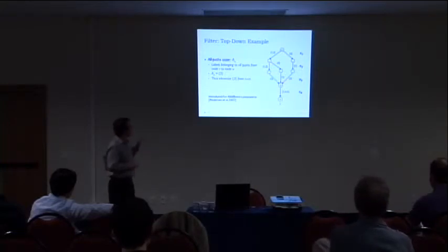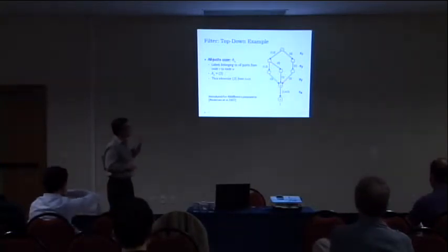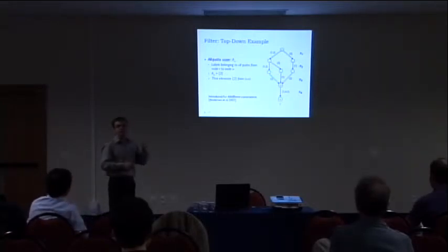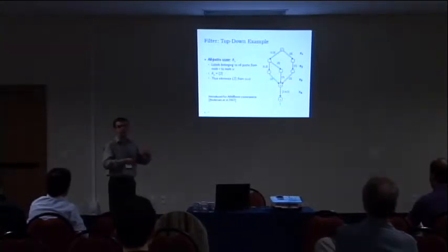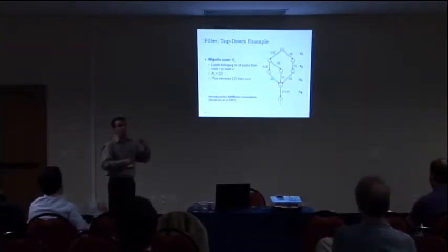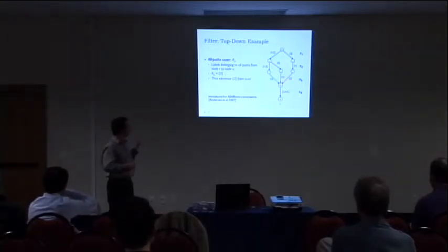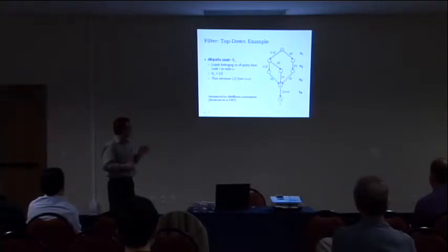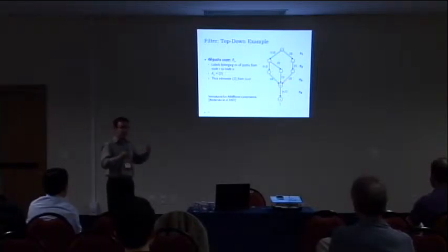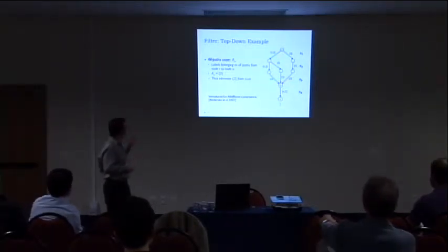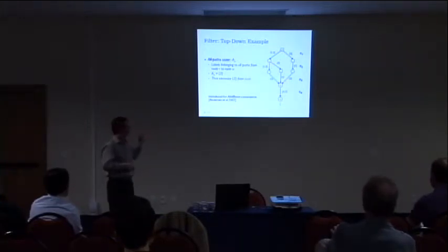Now, let's see. The paths from the root to the node U correspond to partial sequences in the machine, in the resource, the possibilities of sequences that you performed so far. Now, if you know that in all previous sequences, you have already processed activity 3, you must not process it anymore. So you can already remove activity 3 from the domain of the arc UV. Okay, so then we filter the MDD by doing so. And this is the same as the all-different constraint that we can also use for MDDs. But we can also use schedule information.